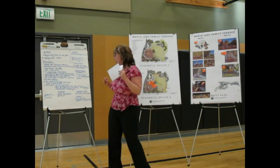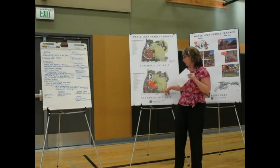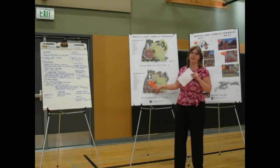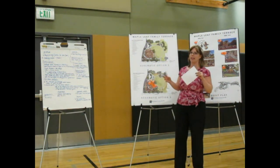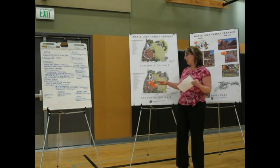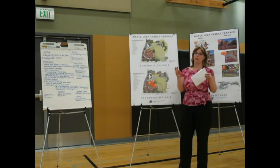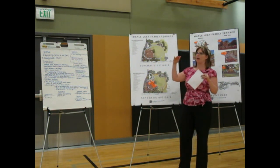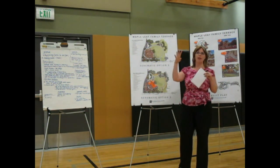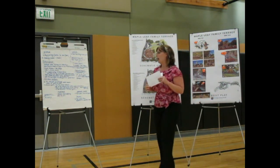There was some talk about the fence, and I don't know how much we really got into this, but we did look at the feasibility of replacing the fence, and through our budget and everything, we decided that our priorities were elsewhere. But if things shake out and we do have money, maybe we could replace some of the mesh. The existing art poles will stay in place, but right now, from what I understand, it's a 10-foot fence, so maybe looking at doing something a little bit lower would be an option.